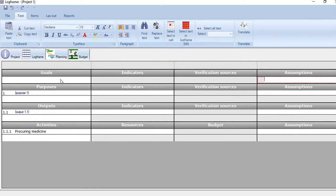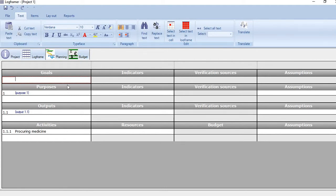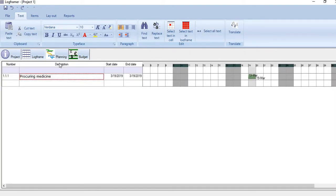Once you add a goal, you will see a new line will also appear where you can add another goal. The list of activities that you create here will automatically appear in the next component, which is Planning.